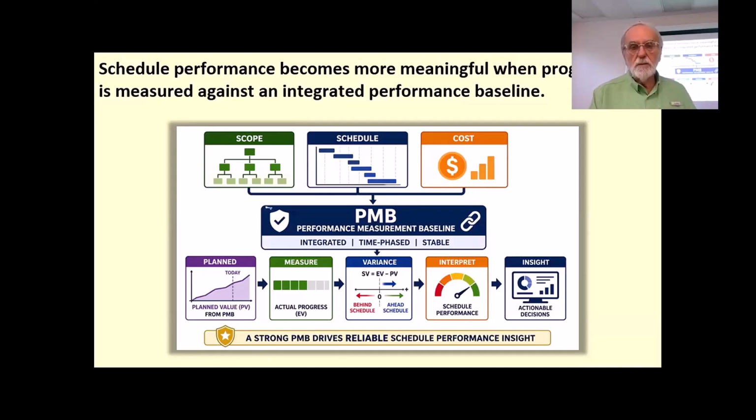That's where we integrate the scope, schedule, and cost all into one time-phased coordinated basis for performance measurement. So in other words, we take the schedule, we lay over that the sequencing of when we expect to spend money. We also layer over that the sequence of when we expect to complete deliverables. We can do all that once we have the schedule done, and that becomes our baseline for understanding earned value, because earned value integrates those together. In most projects I've worked on, we just kind of call it the baseline. We don't differentiate between schedule or scope.